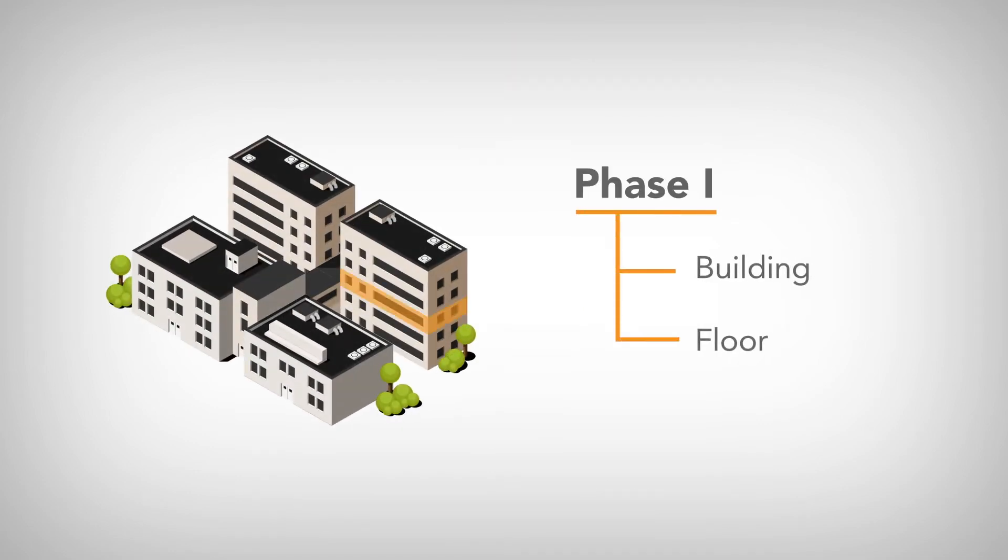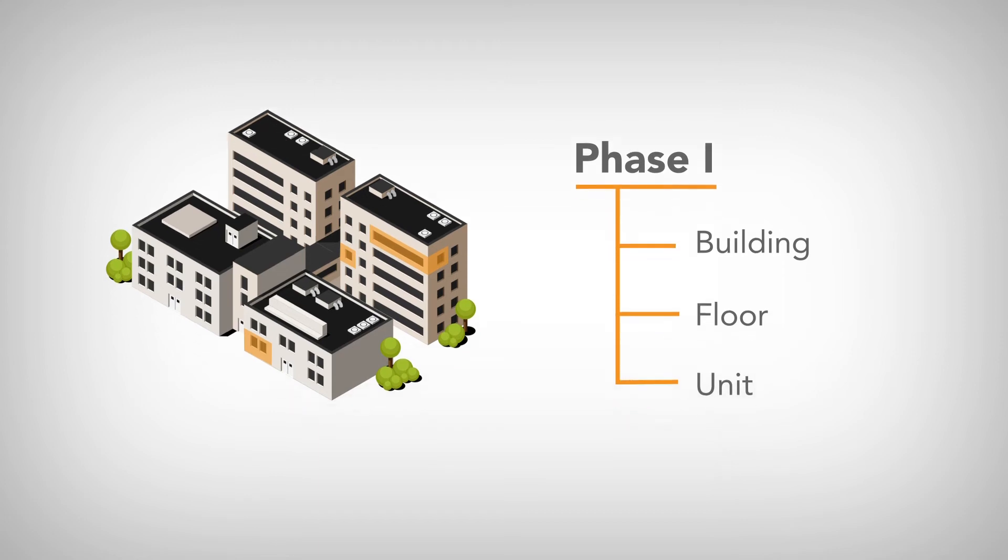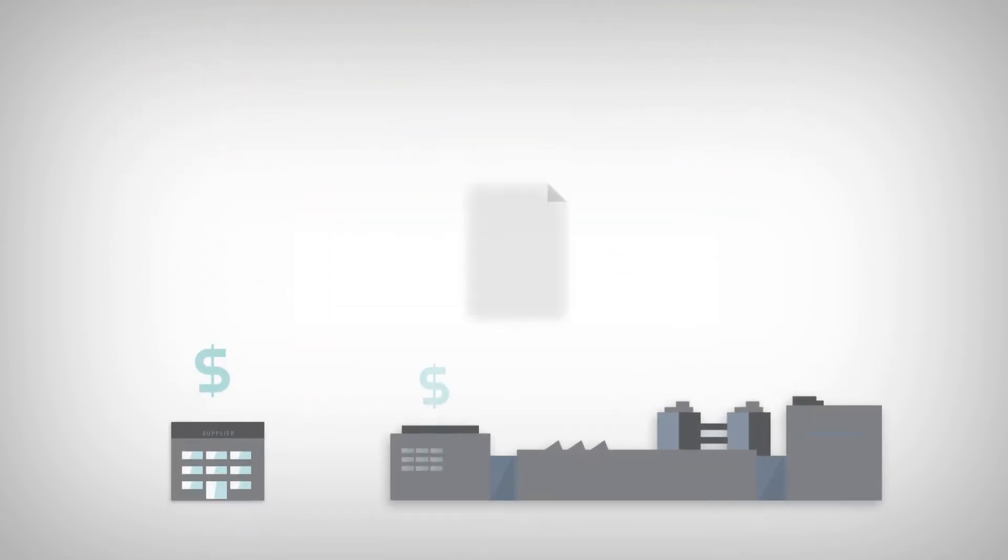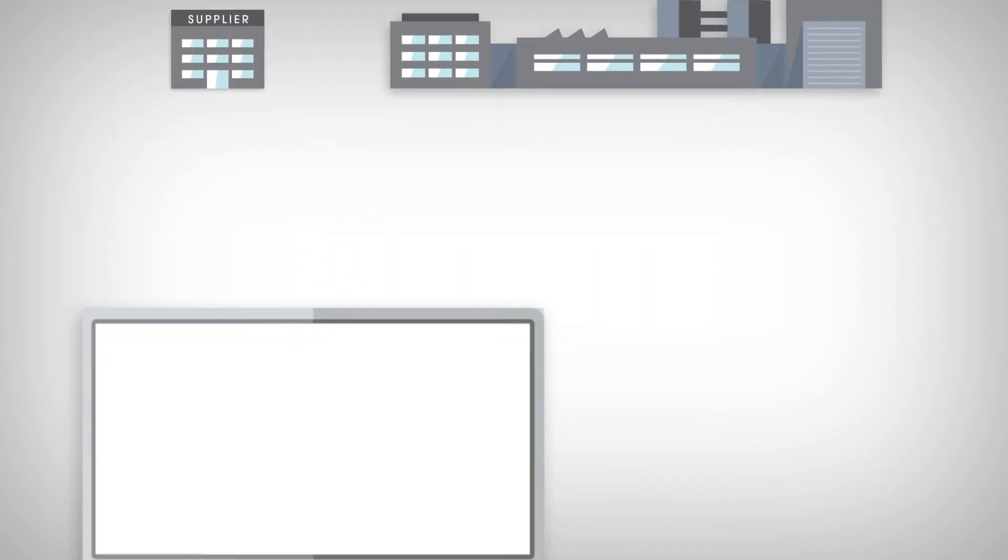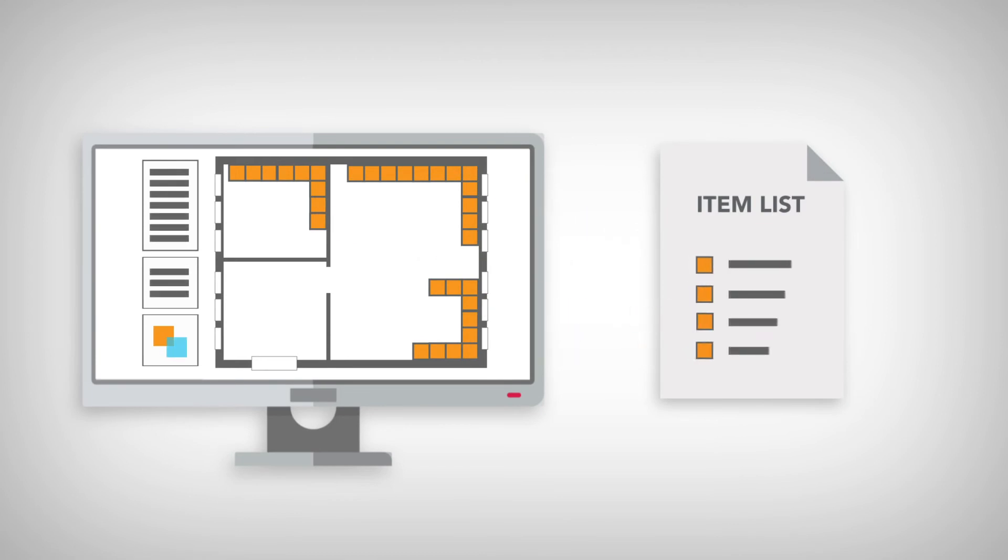Create accurate estimates based on true costs. Electronically generate takeoffs and add schedule of values items like demolition, plumbing, and other subcontracts.